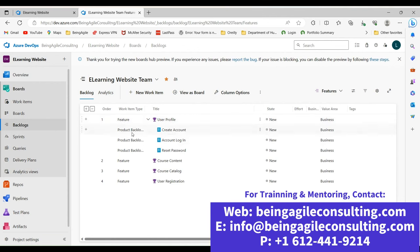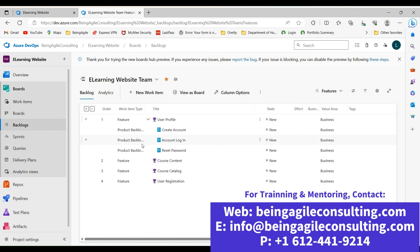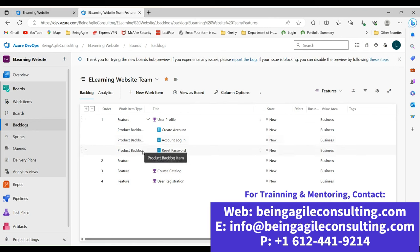The reason I love this approach — rather than just randomly creating user stories as most people do — is that once you do it this way, you are immediately linking your items together, following the work items hierarchy from features to user stories to tasks as Azure DevOps structures it. Your work items will not be disconnected and all over the place. It helps you stay organized and communicate clear, concise information to your team and to leadership.